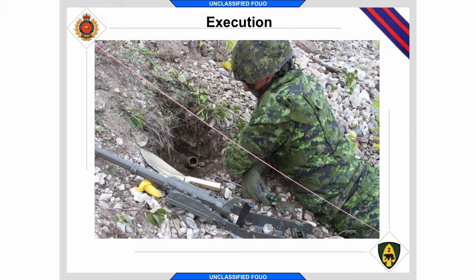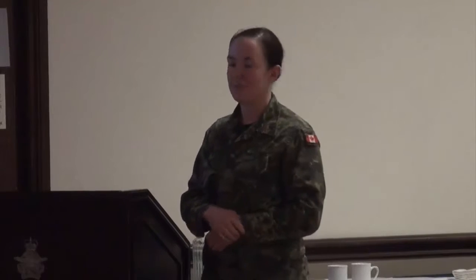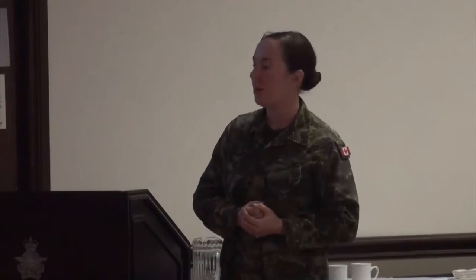So they would dig them out. That would also, as you'll see later, we were trying to pull the pipes out of the hillside, so freeing up that space around it. As they were doing this, as they were working intimately with the pipes, they would douse them with nitroglycerin destroyer as an extra safety measure. I'll talk about that a bit later, basically chemical neutralization of any remaining NG. Next.